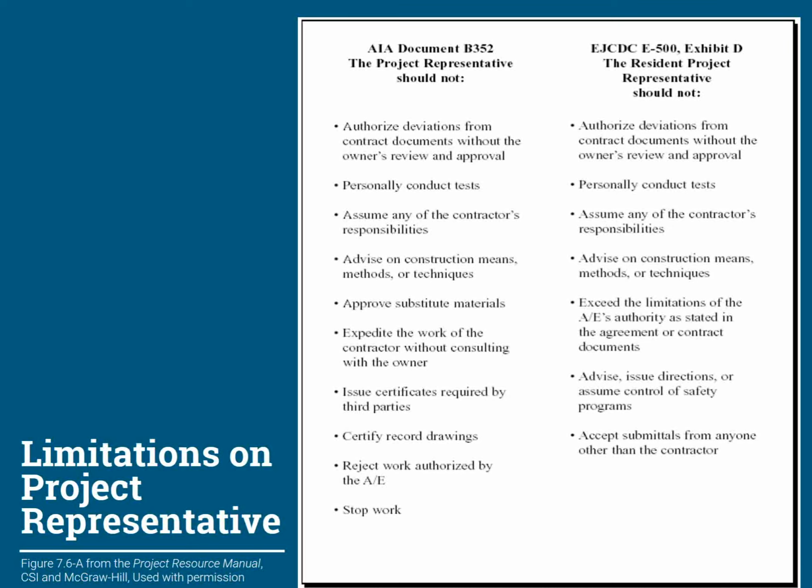It can lead to acceptance. It can lead to acceptance with some contract adjustment. So all those things have to be considered when there's a substitution request presented by the contractor. Typically, though, it comes to the architect engineer who reviews it in conjunction with their client.